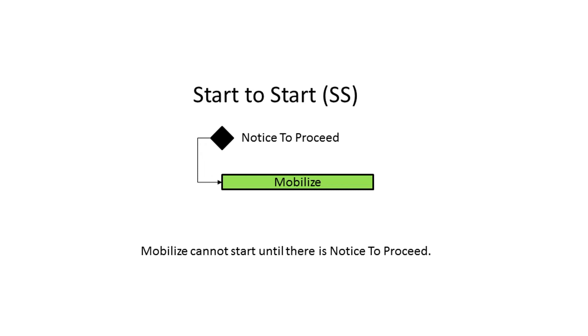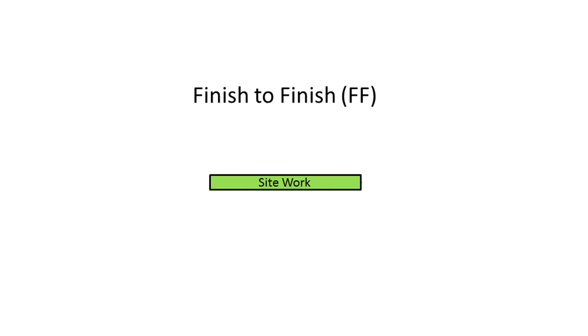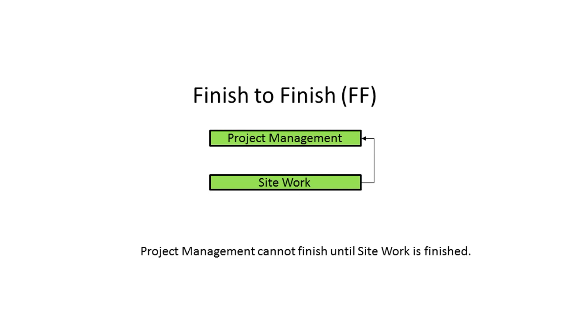The next relationship type is finish-to-finish. This relationship type states that the succeeding activity cannot finish until its predecessor finishes. In our example, we can see that project management will not finish until all site work is finished.